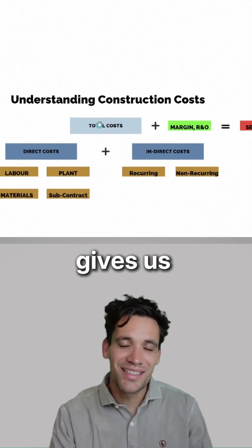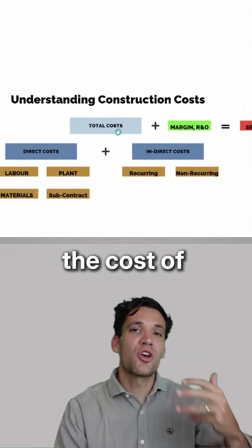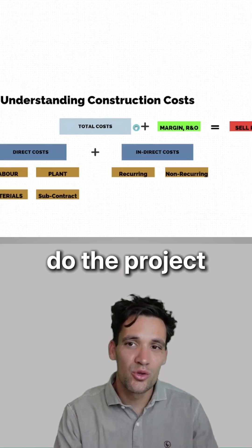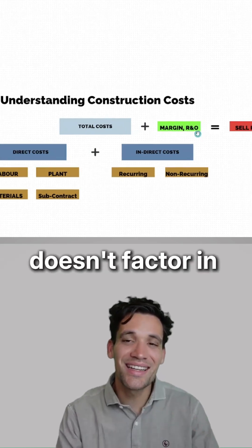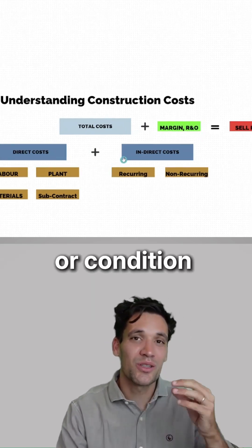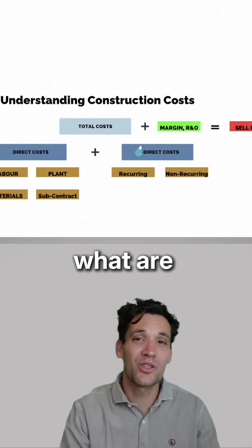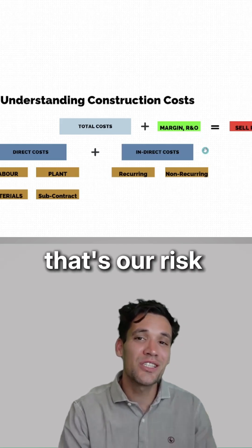Direct plus indirect gives us our total project cost, the cost of all the resources we need to do the project. What this doesn't factor in is any uncertain events or conditions. How much is it going to rain? What are the ground conditions going to be like? That's our risk and opportunity.